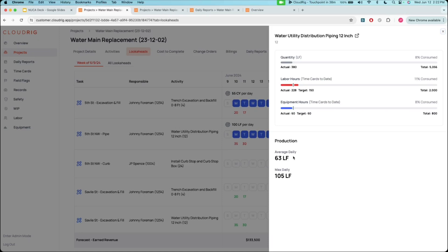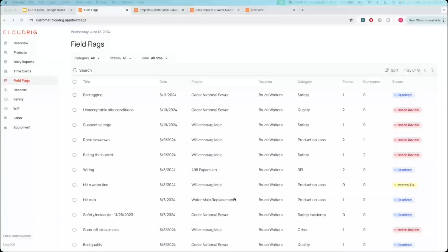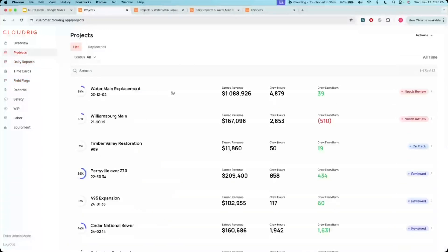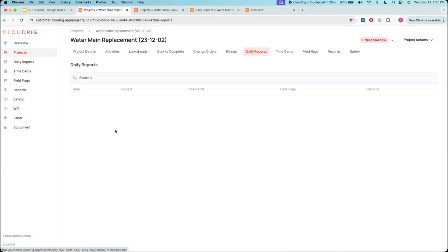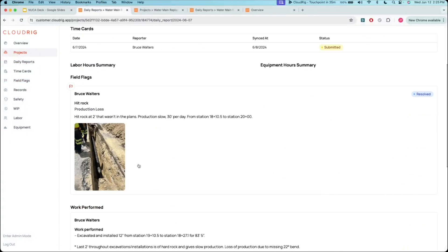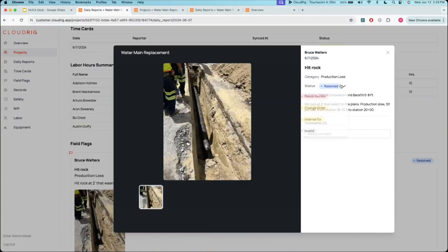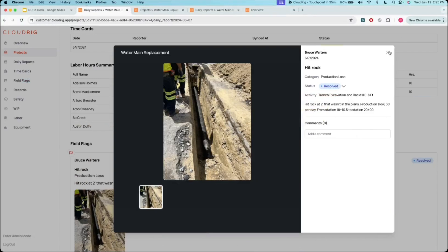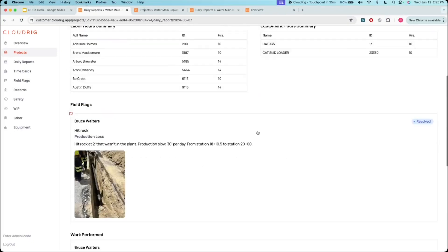Stan, I saw you adjusted a lookahead for one of your big jobs just this week in response to this exact alert. What is marrying past and future, historicals and plan all in one screen, done for your PM's ability to set smart targets? Well, our PMs are very optimistic. We have a corporate ambition, which is an annual budget. This is what we're targeting. Our PMs who are doing the forecasting were getting a little overly optimistic. We have the ability to say, hey, they're putting in 160 feet a day. I'm thinking, I'm not sure we've ever done 160 feet a day, but we have the ability to use CloudRig, go back to our historical performance, look through the last three quarters and say, have we actually ever done this? And what do we average? Then you can kind of true up your numbers.